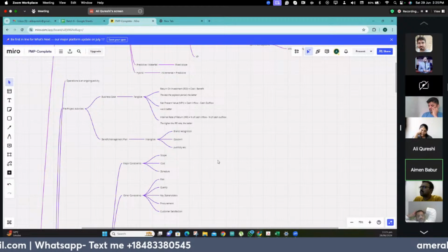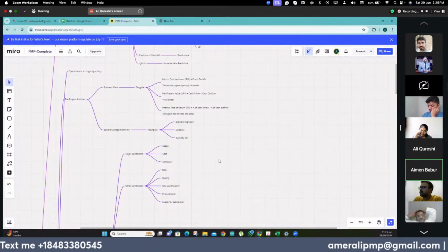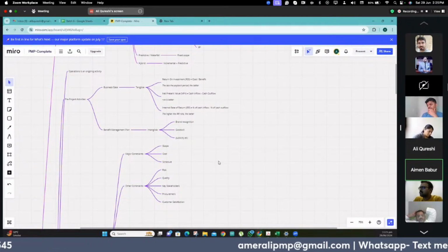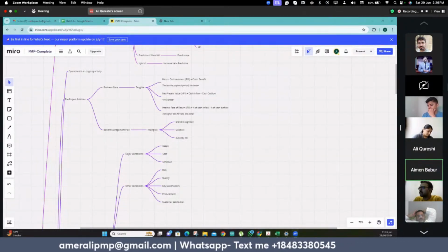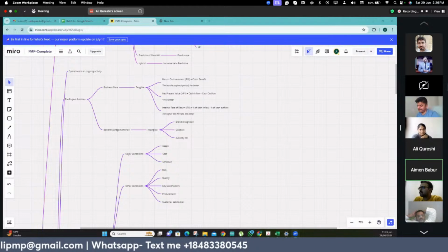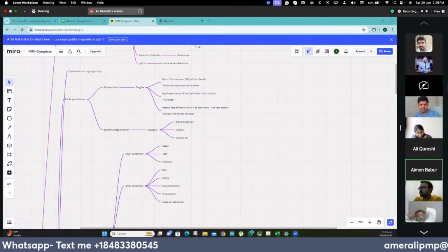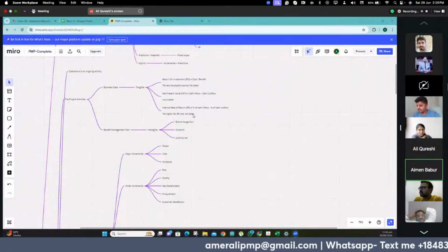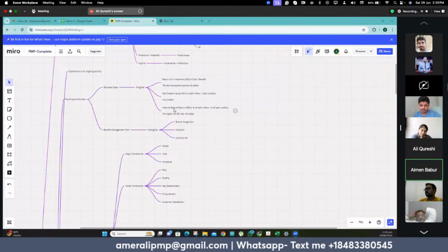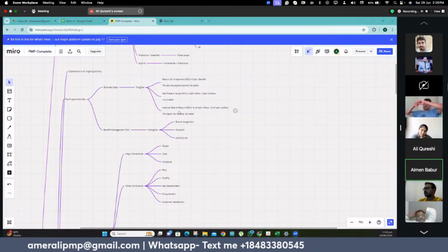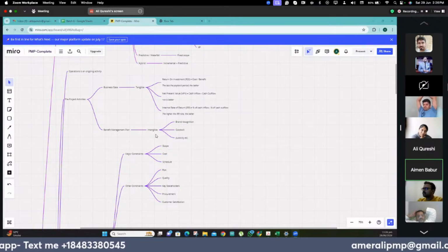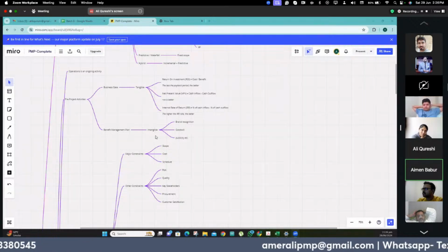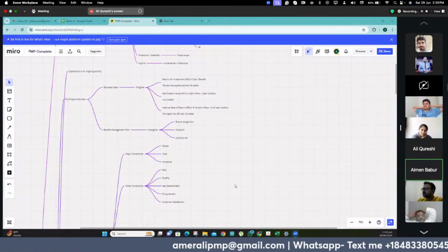Okay, so first we have pre-project activities in the fundamentals. In pre-project activities, we have a business case and a benefit management plan. In the business case, we include the tangible quantities like return on investment, cash flow, NPV, and IRR, these types of parameters. While in the benefit management plan, we include the intangible parameters, which include brand recognition, goodwill, publicity, etc. A bit down, Ali.